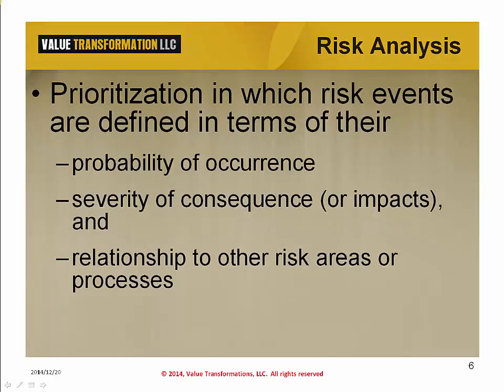We're going to pore over our list and consider the likelihood of occurrence of each risk in our risk list and the severity, as well as the dependencies regarding the risk. In other words, if this goes wrong, what are the consequences on dependent actions downstream? Recall from the first module how risk and dependencies work together. We are concerned with what collateral damage comes from the risk. Not all can be seen immediately when the risk occurs or when the problem that the risk represents occurs.